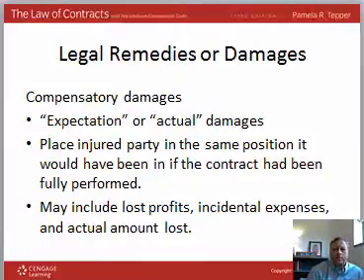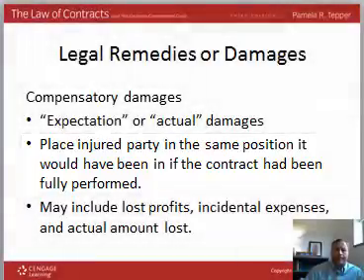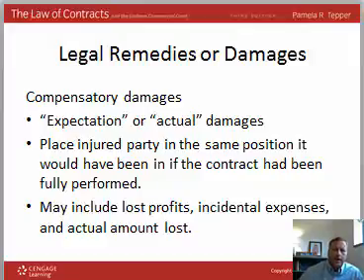Courts often determine appropriate damage to award an injured party by evaluating the extent and the severity of the non-performing party's acts. When damages have been suffered by an injured party, the court is going to attempt to place that party back in the same financial position it would have been had the non-performing party actually performed their end of the bargain. Consequently, money damages are usually awarded when someone has breached a contractual obligation and that breach resulted in damages. The legal remedies that are awarded by a court can be categorized as compensatory, consequential, nominal, and liquidated.